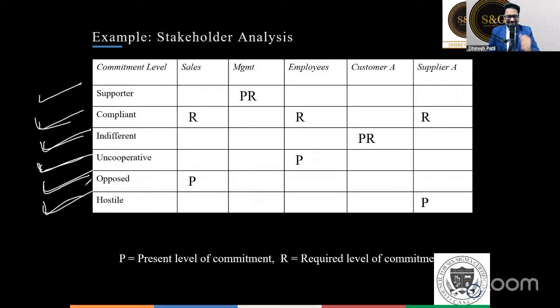I'll give you an example. I think I gave this example multiple times, from one of the projects in Indonesia, where in the project solutions we had put some sensors in the machine just to check the speed and how much time that machine is running, just to calculate the productivity. Now these workmen in the night shift were so afraid. They used to cut the cords, the wires, cables of those encoders and the sensors we had put over there, because they had the fear in their mind that if this project succeeds, we might lose our job.